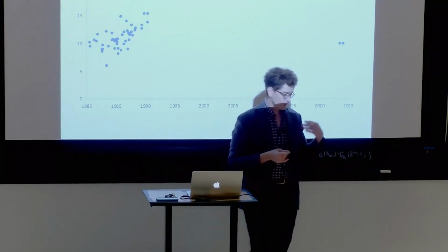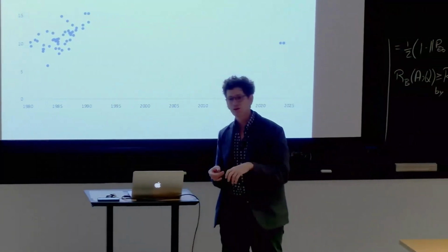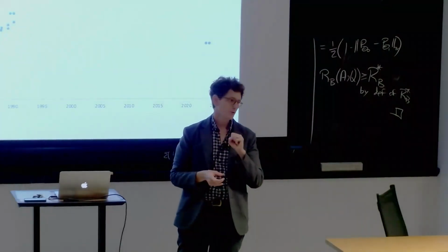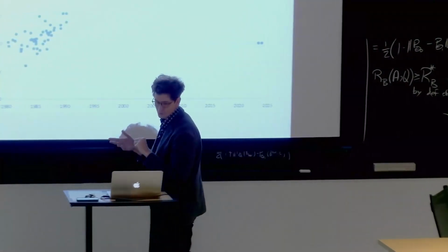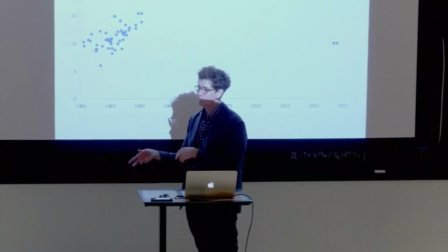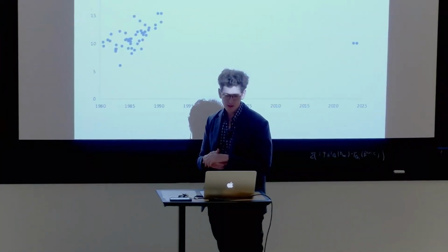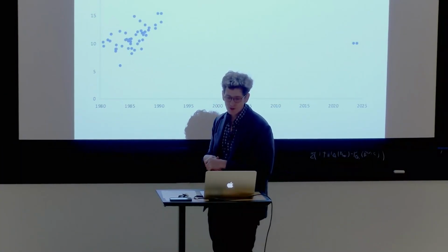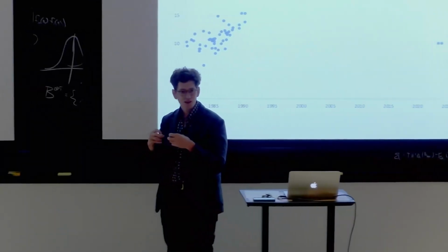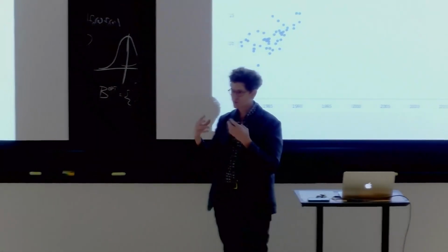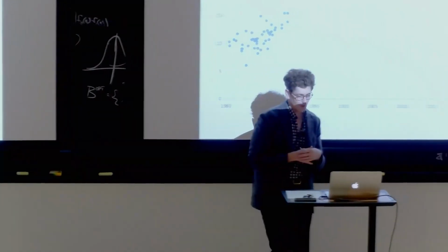For example, they would pour concrete, then the concrete wouldn't be as strong as it was supposed to be. They'd have to rip it out and put in new concrete. Or there were issues with improperly installed rebar in the basement, so then they had to rip it all out. So this suggests these are measures of the complexity of the technology and all the safety versions associated with a complex technology.